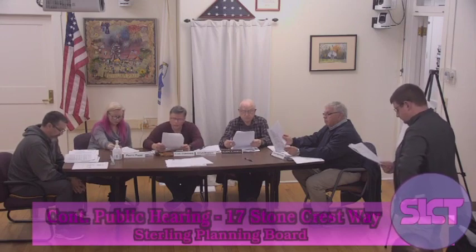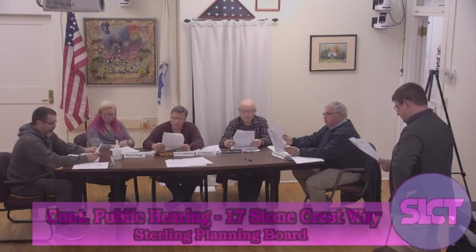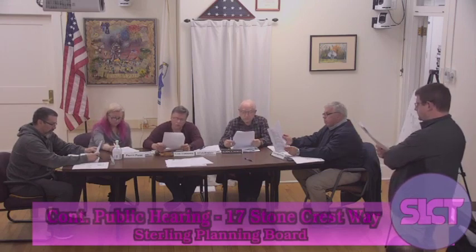14, the Planning Board's consulting engineer shall inspect the project while under construction and issue reports to the Planning Board as necessary. The cost of this inspection service shall be paid for by the applicant, with the necessary funds deposited with the town into a 53G consultant review account. Said account shall maintain a minimum of $2,000.